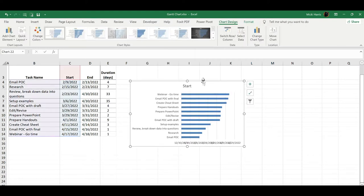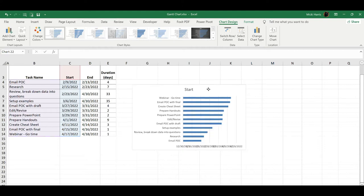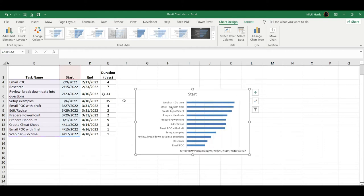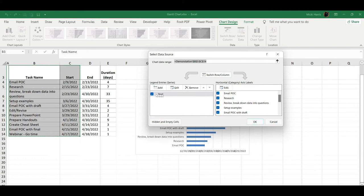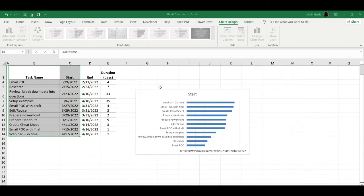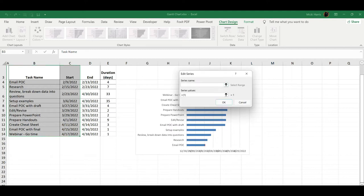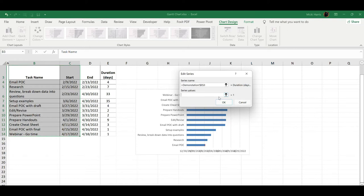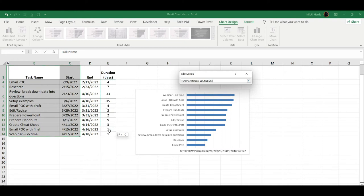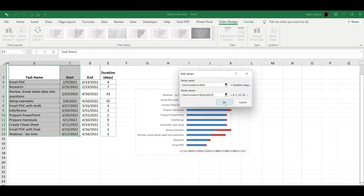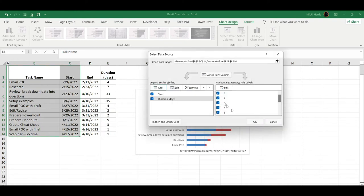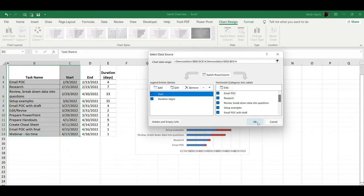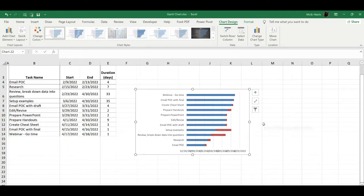So now I need to actually add my duration to this chart. So on my Chart Design tab, I'm going to go to Select Data, and you can see that we have the start here, but I need to add that duration. So click on Add, and my series name is duration days, and then my series values, I want to get rid of what's already there, and then I'm going to select the range that has my duration. And then I click OK, and click OK again.